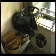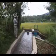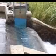The result was a proposal for the replacement of the entire electromechanical equipment with a new unit capable of producing up to 25 kilowatts of power, more than double the original output. In addition to the replacement of the electromechanical equipment, upgrading of the transmission and distribution lines and all associated switchgear was required. It was calculated that the existing civil works components were adequate in size for the new design flow, therefore avoiding any rebuilding of these structures.